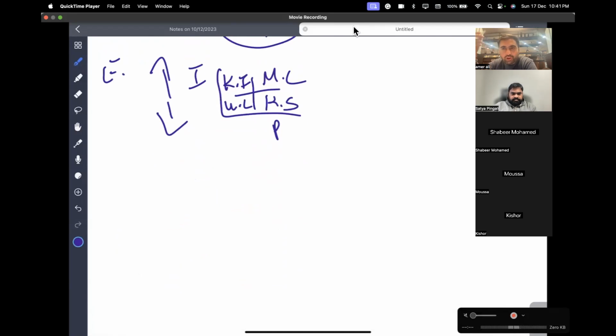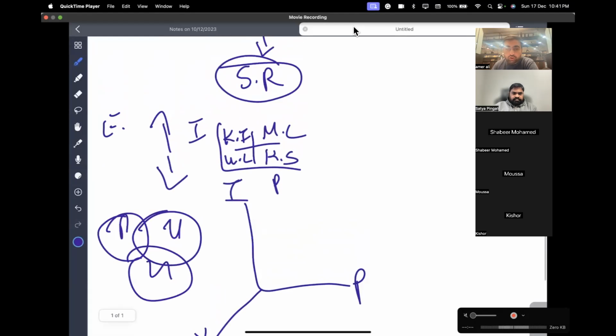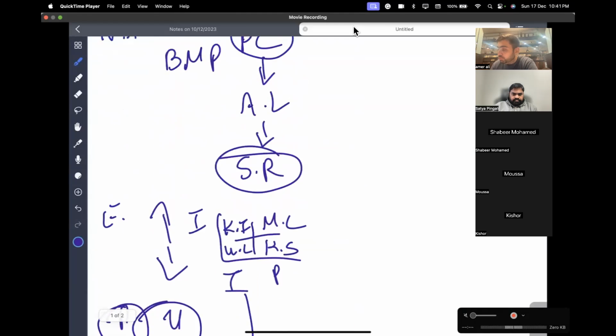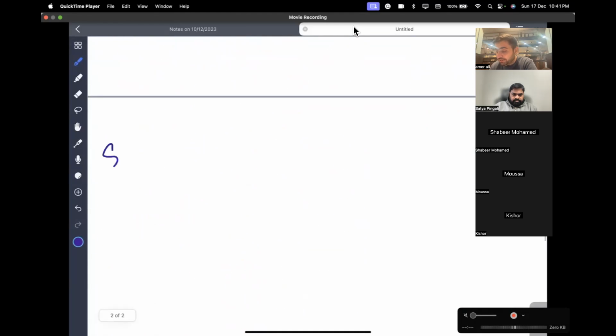Then we also look at other areas. If we want to look at three dimensions, we have the stakeholder cube: power, interest, and one other dimension, or the salience model: power, urgency, legitimacy. Once your stakeholder register is updated with the important stakeholders, we go to the planning area. We move from here to here, and we make the stakeholder engagement plan.